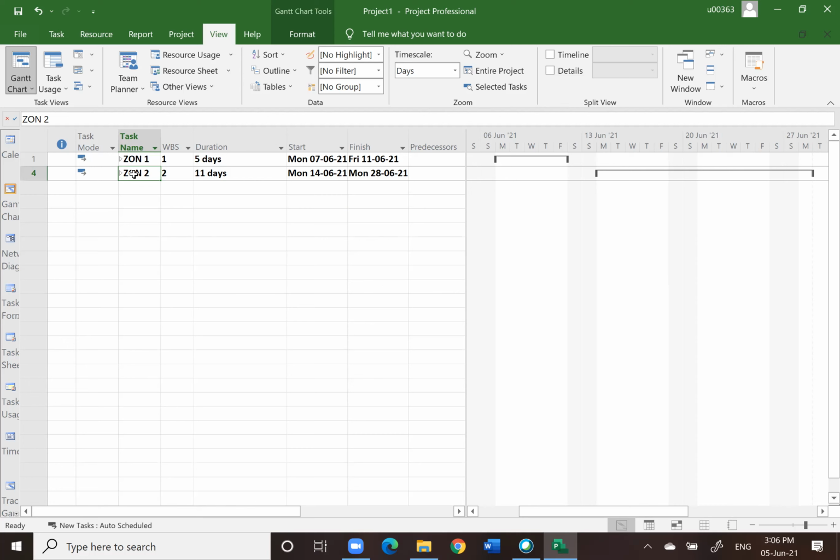So normally when we mention the types of scheduling, we have the master plan, and then we have the detail project. Normally the master plan we might submit, depending on who is going to read it. If you have thousands and thousands of activities with all kinds of detailing, the big boss might not be interested in all those details. The big boss just wants to look at the overall. So when you want to show the overall, you simply show the main activities, and it will look something like this.